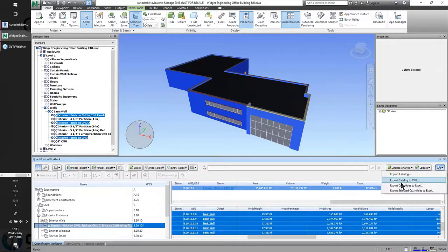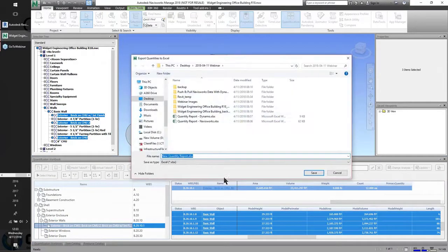My next step is to export the quantities to Excel. Now, this is where I was talking about exporting this particular catalog for hospital projects or prison projects. You see recurring materials over and over in these jobs. It wouldn't hurt to automate your process whenever you're quantifying. And I would say this would cater more towards a design standpoint, simply because we're not getting into setbacks or environmental fees. We're actually just quantifying our geometry, and maybe there might be some QA, QC involved in recreating the original model. So after I quantify, I'll go ahead and export those quantities to Excel.